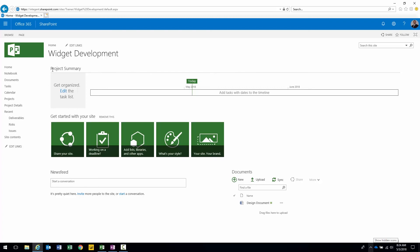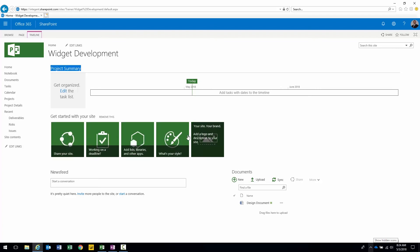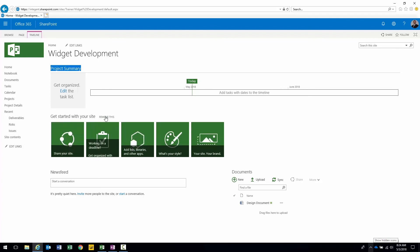You have a project summary area here. It's going to have a timeline that will show you important events. For this to actually synchronize with those important events we do have to specify that it will sync with tasks within the enterprise project type. We have a get started on your site section. This can be removed pretty easily.